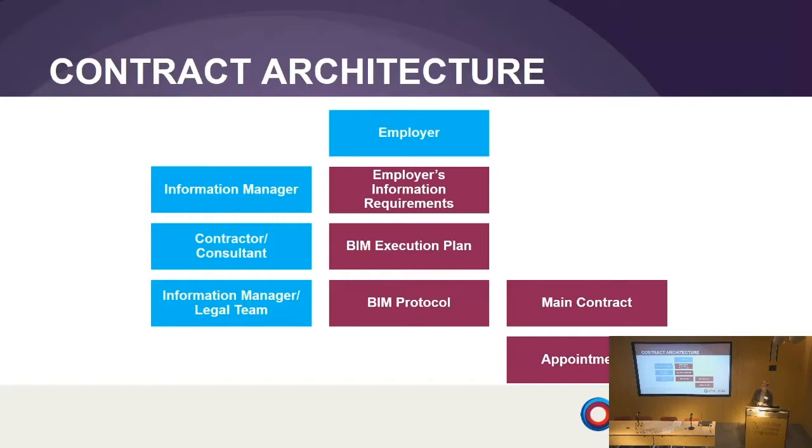And then perhaps more importantly for you guys as consultants, that flows down into the BIM protocol. So we take out the crucial aspects of both of those documents, put them into the BIM protocol, and that then will get attached to a consultant appointment. So everybody should be singing from the same hymn sheet, is how the theory should work.